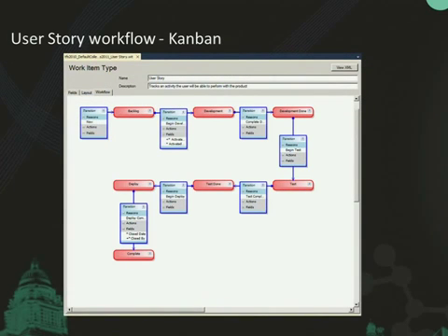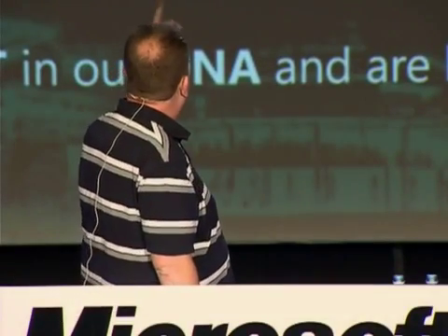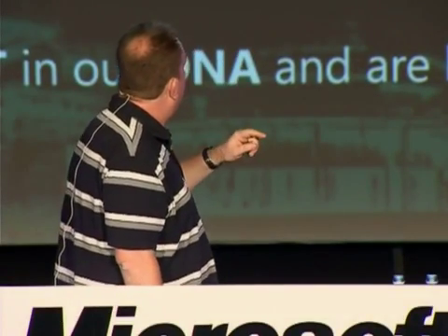And this is in the Kanban demo I'm going to show you, this is the workflow that I've modeled. Now, it is simplified from the one you'd really want, but it's got several stages. It goes from backlog to development done, and then down to test, and then to test done, then it goes to deploy, and then it's complete.